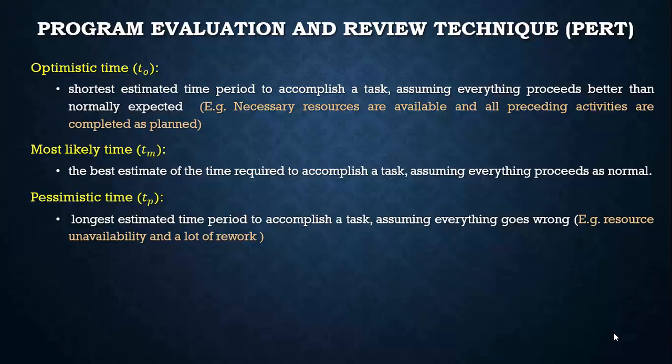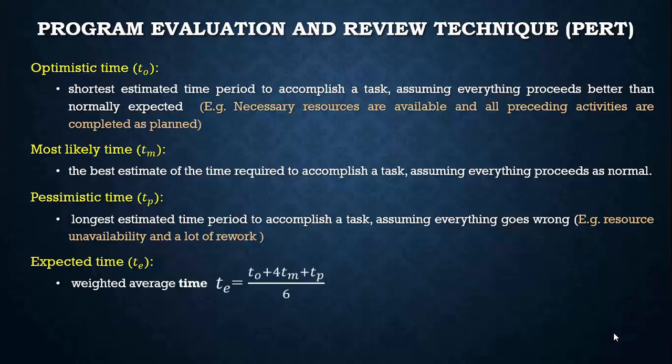We need to find a definite time — the expected time — in order to construct the network. It is found using the above three different time estimates and is a weighted average time. The expected time duration is found using the formula: optimistic time plus four times the most likely time plus pessimistic time, all divided by six.